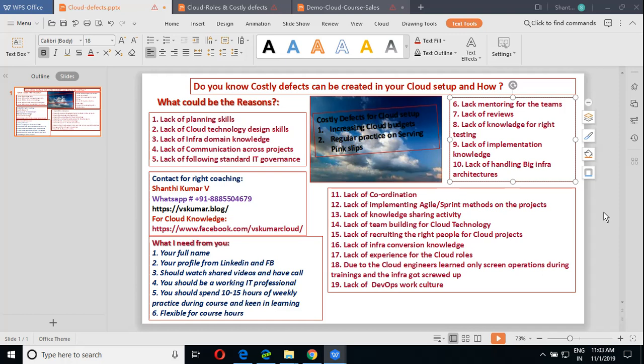What are you going to do? They need to study that. They need to bring the specifications clearly, and they need to have the old architecture diagrams. Then they need to prepare for the particular cloud service, AWS or GCP or Azure. They need to check what kind of components can be moved on priority, what the dependencies are, what the APIs are, and if it is on premises, how to connect to AWS services. All that needs to be planned. If it is not planned, it is a big failure in the project itself.